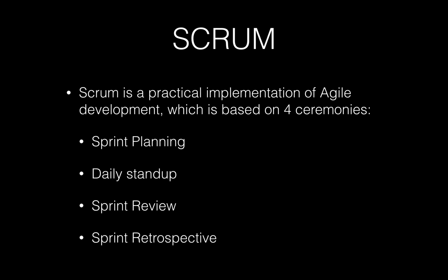One is sprint planning. Sprint planning is basically where the team sits down, collaborates on what the requirements are, quickly goes through the requirements, figures out what needs to get done, and makes sure they understand the requirements properly from the business side. Then they start planning how we're going to tackle these stories, right? It's very minimal, very quick, and it's basically for one sprint. So instead of planning the entire product, you're only planning for one sprint.